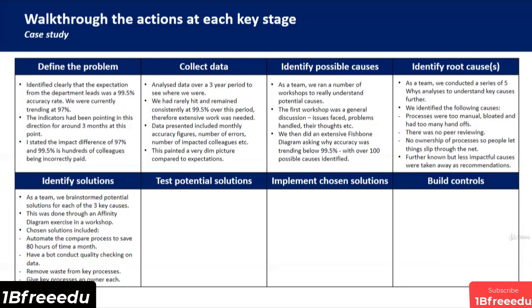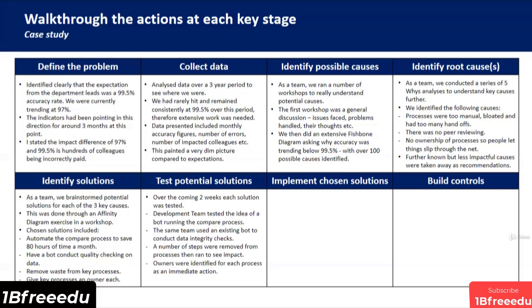So once we've identified the solutions, we then obviously had to test those solutions. And over the coming 2 weeks, each solution was tested. Remember, when looking to test your solutions, do not test them over a space of 3, 4, 5 months. Try and get them all done within the same period of time.